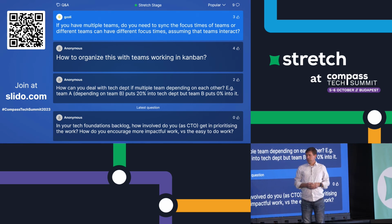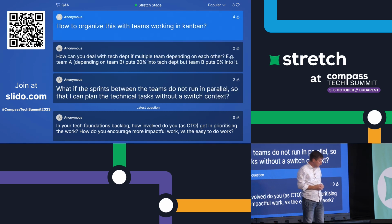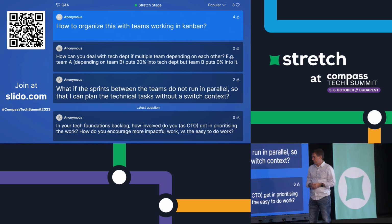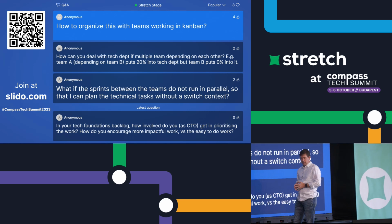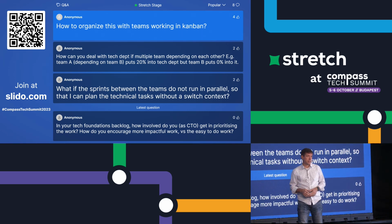Okay. Let's see the next one. How to organize this with teams working in Kanban? Yep. It's much the same, right? In Kanban, you're not necessarily working in increments, but you're still working in time, right? So you can just work for 4 weeks Kanban style on product work, and then you switch and do the Tech Foundation work.